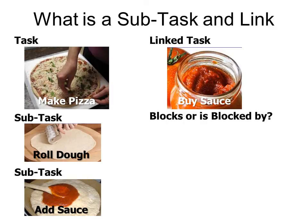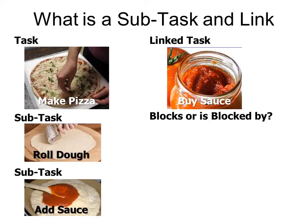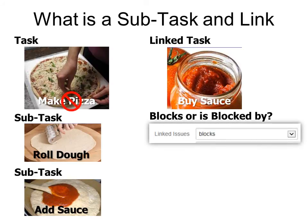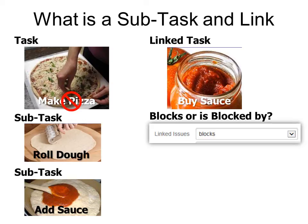In other words, can you make the pizza before you buy the sauce or must you buy the sauce first? You cannot make the pizza without the sauce. So it blocks the make pizza task. So that hopefully will explain the difference between tasks, subtasks, linked and blocked issues.